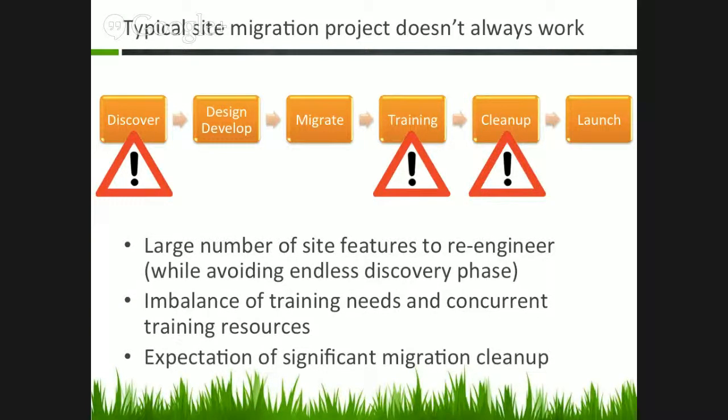And then content cleanup. The more expectation you have that there will be a manual intervention, and the more people that have to be involved in that. So you may have subject matter experts that have to be the ones to look at their section of the site, and multiply that situation across a dozen offices, and you have dozens of people who need to coordinate schedules. Again, trying to fit all of that within a 1-week period or a 2-week period just becomes impractical, and again, it can delay the launch.